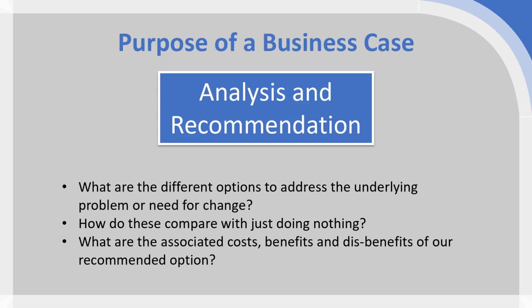So you need at least to address these two different options, one to actually address the problem in a way that you think fit, and the other one of just not running the project. That's the only way to truly evaluate whether the project is worth doing. Now, as well as this, you may have additional options.